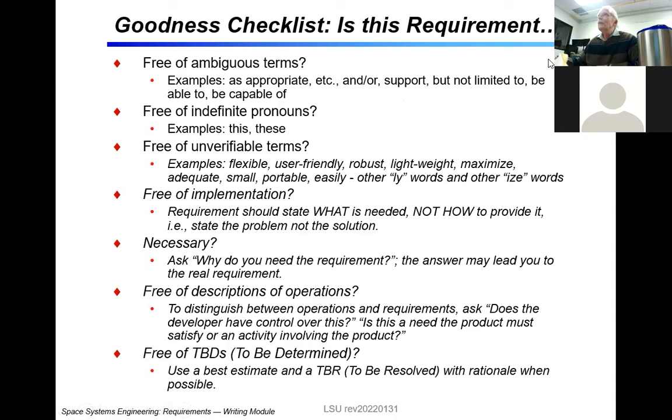All right. If there's any word in your requirement that ends in "ly" or "ize," right, you ought to rewrite that requirement. No "ly" or "ize" words are allowed. No easily, no portable, no adequate, no maximize, no friendly, etc. These are again words which are ambiguous.